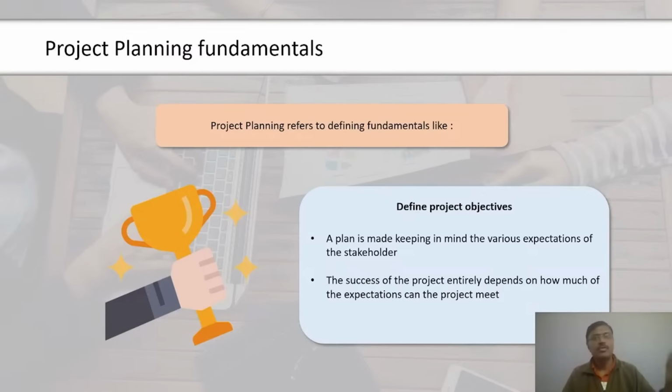Let's discuss control account in the next screen. Control account is an important concept in project cost management. Project cost is generally estimated at individual activity level. It becomes difficult to manage cost at the activity level in large projects. Therefore, the cost is managed at a high level. This requires related activities to be clubbed and their cost being managed together as one unit. This unit is called a control account.